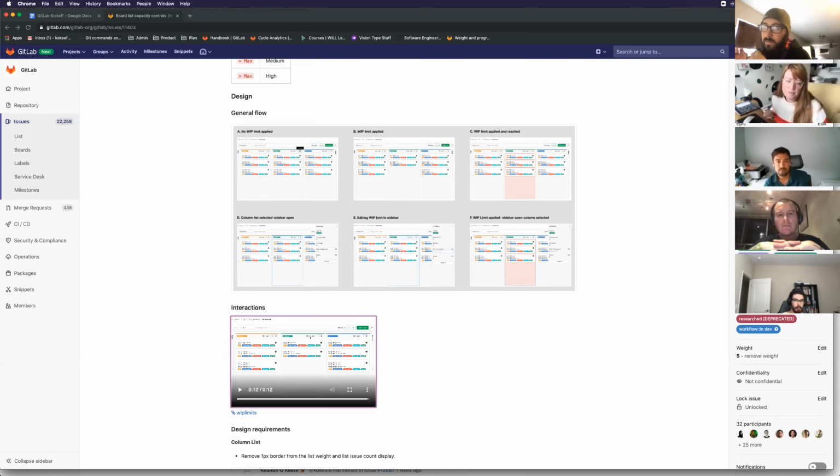Yeah, a lot of it comes down to how they're wanting to use it. In my experience, it often gets controlled by team structure. If they have a column for code review or QE or something like that, that's usually where I've seen people put work in progress limits, because there's a resource constraint there. But at the same time, in my to do column at the beginning of my sprint, it might not make sense to have a limit there, because there's going to be a variable number of tickets in that every time. So yeah, I think keeping it as flexible as possible is great.